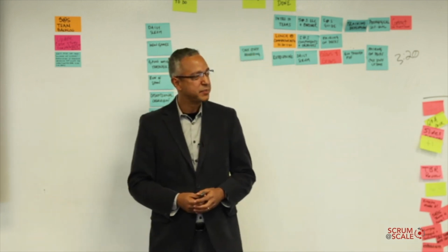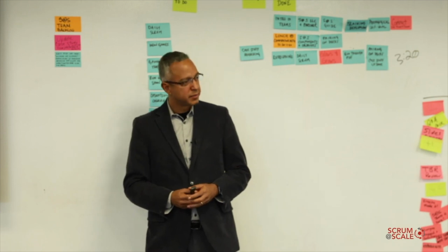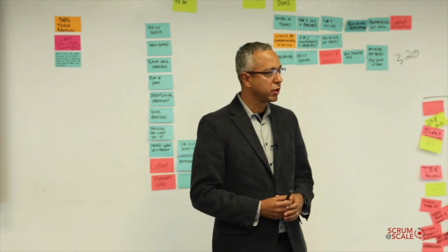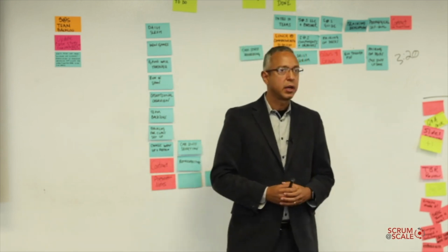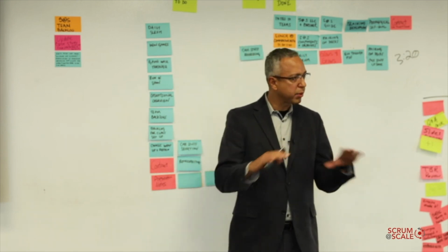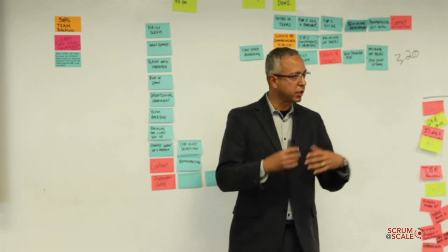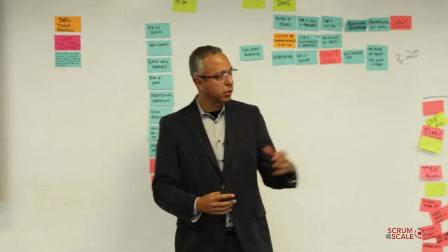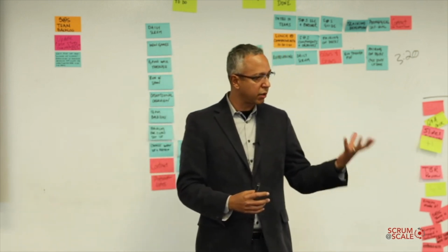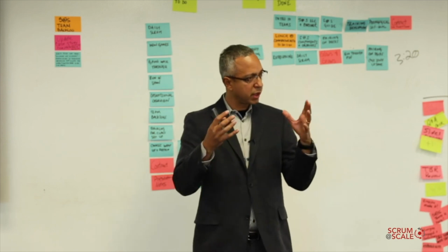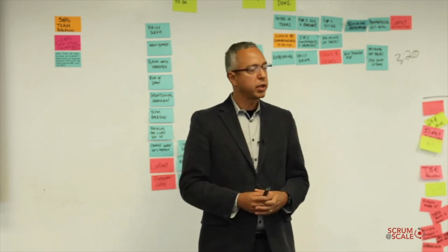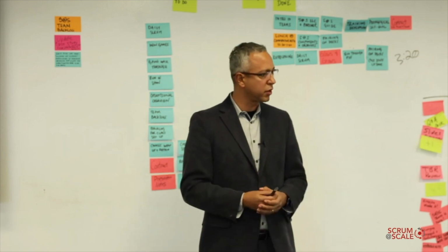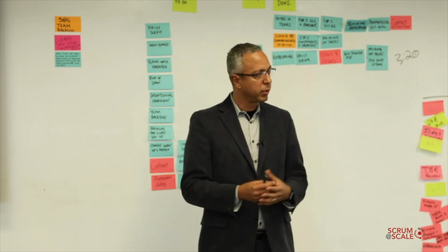How did you deal with the gold plating? So over-architecting. That was a tough problem. That was the problem we had to solve in Service 2. Because the team felt that they needed a perfect architecture in order to get started in delivering customer value. The minute we had a co-located product owner that represented the client and their needs and began to prioritize and really communicate the need to have client delivery to the team, they began to understand why it was important to have a little bit of both as they went.